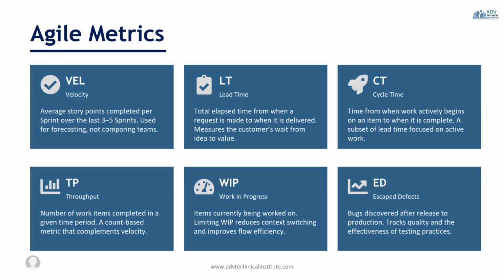Finally, we have escaped defects. These are defects that were not found during development or testing and instead were discovered after release. A high number of escaped defects may indicate gaps in quality assurance, testing, or definition of done.